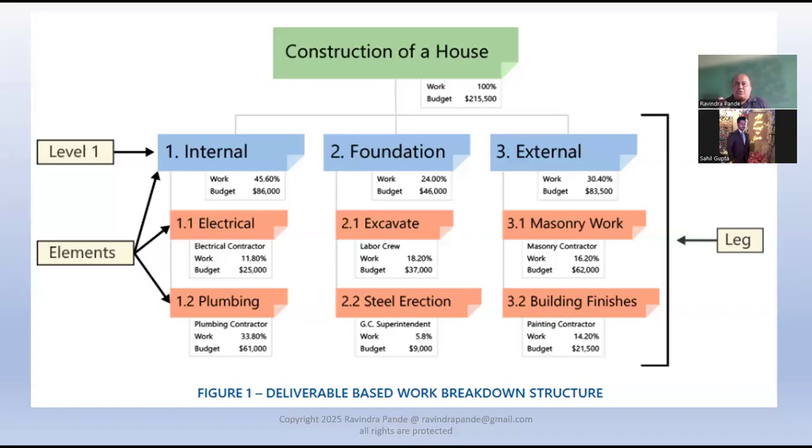And the levels of a breakdown here, there are only two levels mentioned. Let's say foundation. I'll first examine, meaning I'll try to understand how to step down the required place for foundation, what type of steel column and those things have to be inserted, what type of cement I'm inserting, how much time that cement will take to solidify, and so on. So those are my first scope and schedule I'm trying to make.